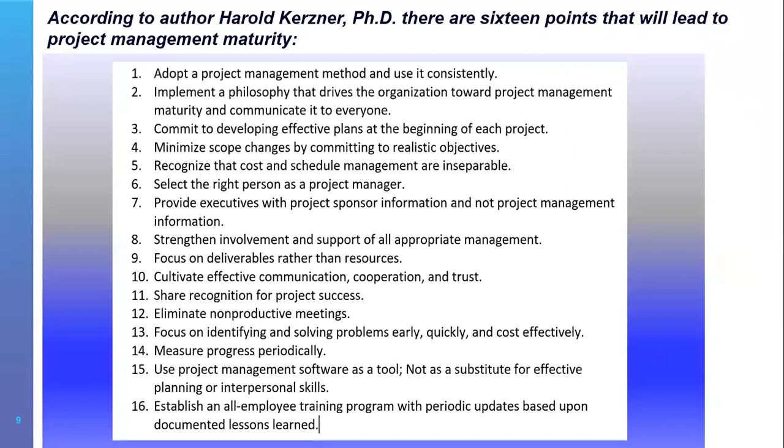Your manufacturing manager asked me to provide 10 more reports. If I do it, I'm fine, but it's not covered by the scope. I need more time and we need to postpone go live. Dear management, please make a decision. Do you want to do it and we go live later? Or can we push it out into a phase 2? Let the management make these decisions, and like I said, organize steering committees regularly every month.